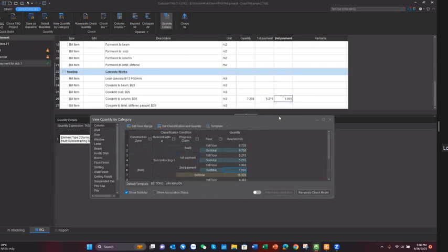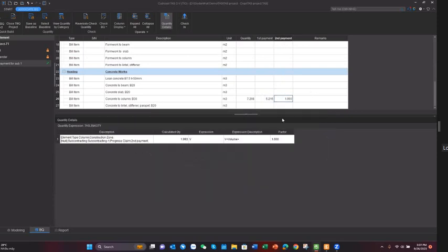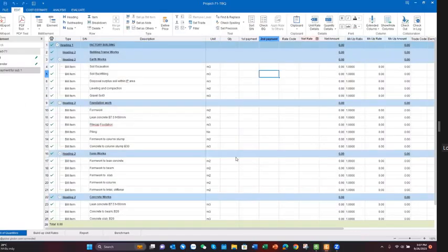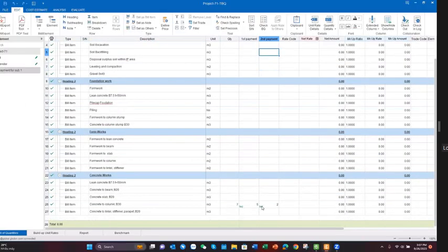So you can set many times and manage the quantity of subcontractor or the payment in real time. And after that, you can click checking to update the quantity to your POQ. Now you return to your POQ, and we have the payment quantity for subcontractor 1. And this is the function for contracting state.